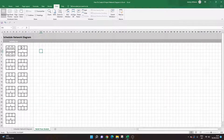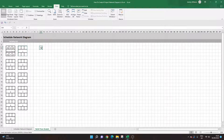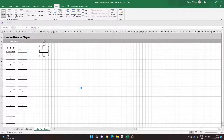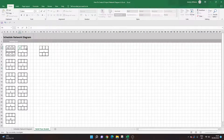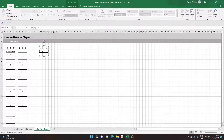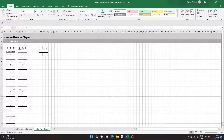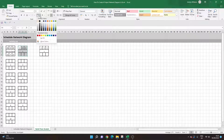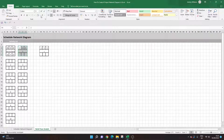Now for the key step: select one of the activity nodes on the left, press Ctrl+C, then go to the diagram area on the right, right-click, and choose Paste Special — select Linked Picture. This means when you update numbers on the left, they automatically populate on the right. The white background we set earlier is important here: it makes each node pop and prevents the grid lines from showing through the linked picture, which would look messy.